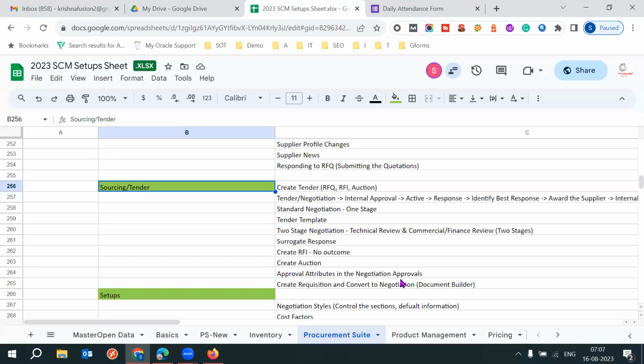In that RFQ, you are going to mention, I want 14 inch laptops. This is the configuration. I'm expecting a 3 year warranty. By default, Windows operating system and MS Office should be there. And it should be 1 TB configuration or so-and-so processor. In the RFQ, you mention your requirement details, what kind of product you're expecting with the clear specifications, payment terms, and everything.